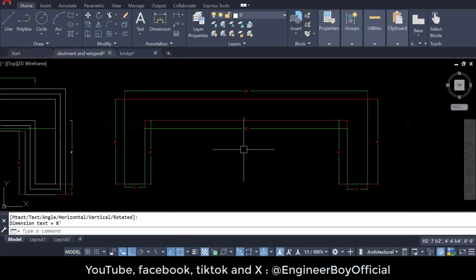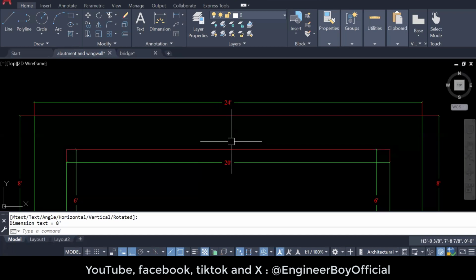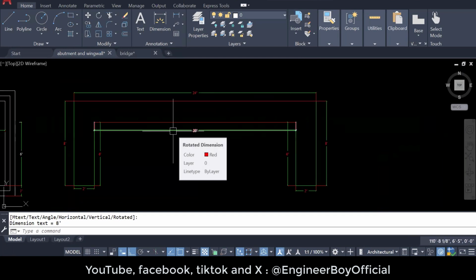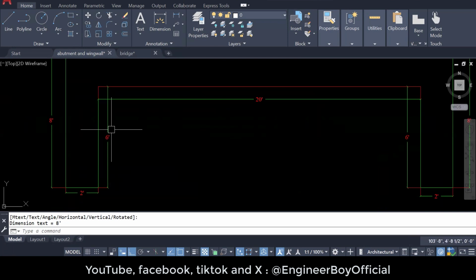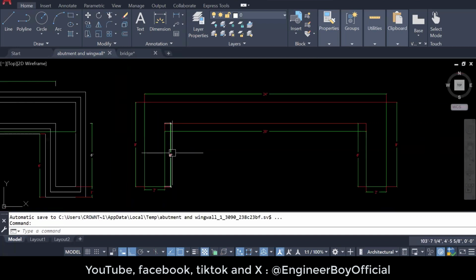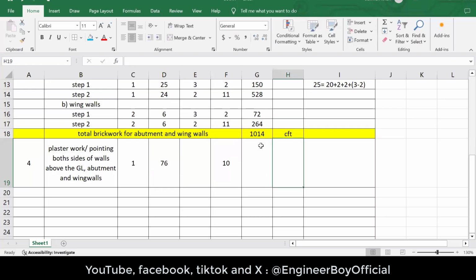You have to add all these parameters together so we can have the total perimeter: 24, then 8, which is 32, then 2, then 6, which is 40, and then 20, so we have 60, and then we have 6 plus 2, which is 8, and then 8 over here, so plus 8, and that's going to be 76. Are you guys there? Yes, sir. Is 76 okay or not? Did anybody calculate that?